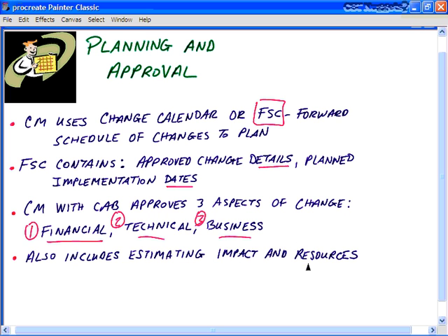This is all part of the planning and approval process. If you don't have the resources available in time, in money, in personnel, then you simply cannot put that RFC into action. Other contingencies may have to take place, or you may have to wait till a later time to implement this change. This may actually tie into an overall organizational policy that your company has. Maybe you have areas of your security policy or your written corporate policy that talks about how your company deals with change. This could be called a change policy.